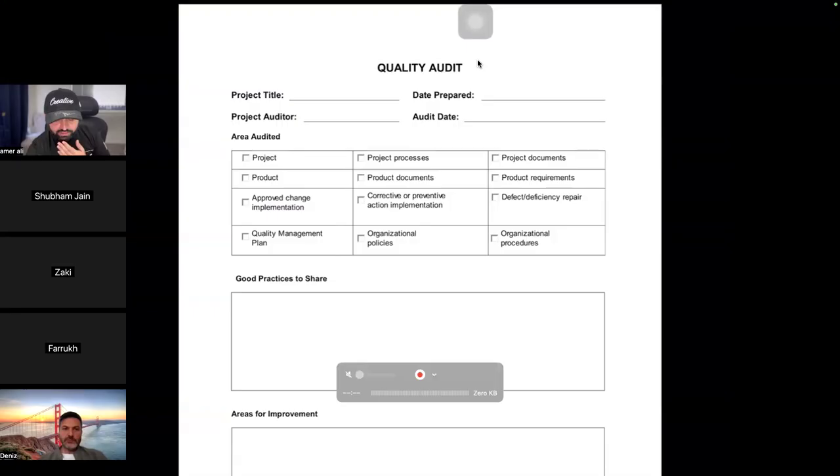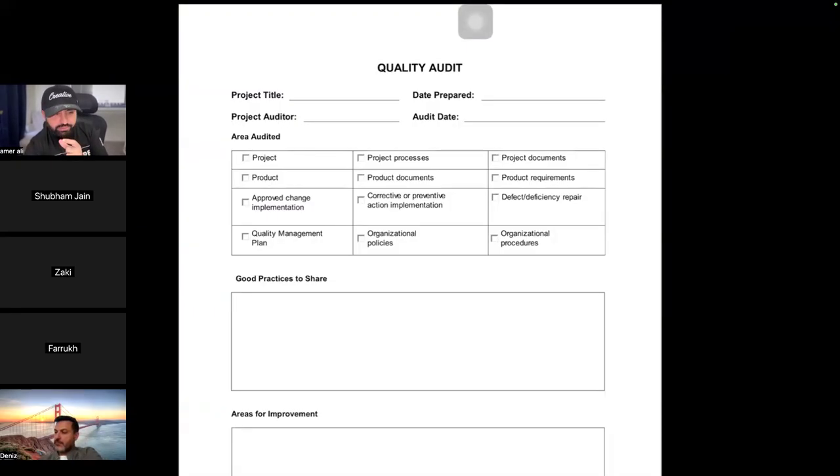And let me give you an example. Let's say you have a car, you check your car daily for the tire pressure, things of that nature, right? That's a preventive action. We do preventive maintenance to make sure things are running smoothly. Corrective action is like this: you check your tire and now your tire pressure is low. You immediately go to the mechanic, and the mechanic fills it. Your tire is back to work. You can go to your job. Defect repair is that your tire is punctured now. I hope that makes sense to you. Preventive action, corrective action, defect repair.